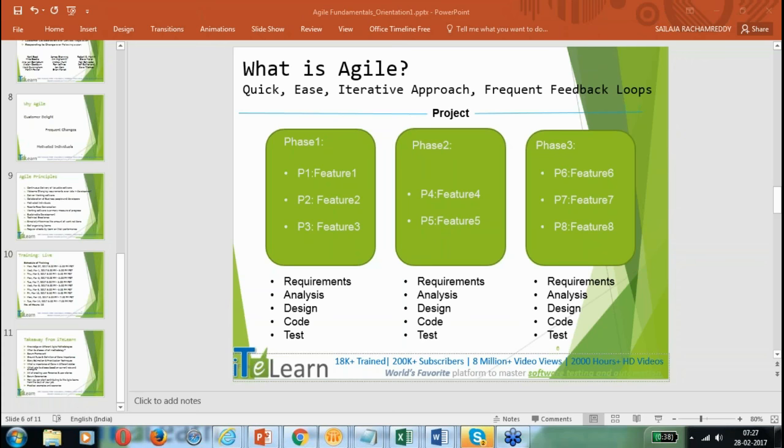That is why Kanban gives you the flexibility: if any important or urgent issue comes up in my production, I'm okay to change it. I'm working on something, so let another person take it up. Whereas that will not happen in Scrum. Within my fixed 2 weeks of time, I'm not going to touch anything apart from my agreed upon work. That is the sprint or the Scrum work.